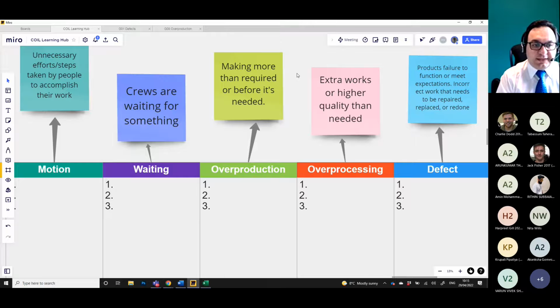So this is a bottleneck, and we call it overproduction. Overproduction in many cases will lead to inventory waste as well, because you have lots of things and components available on site and you need to store them on site, and you will get a messy site, very busy, difficult to circulate. Any question about these wastes so far?